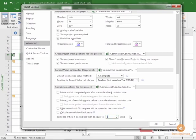This will help you to see tasks that have risk involved with them. So in other words, as tasks get closer to being late, currently, they don't become critical until they have no possible delay. But if you change this number to say one day or two days, then as they get close to zero days delay, they will become critical on the critical path.